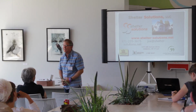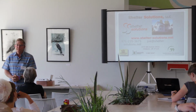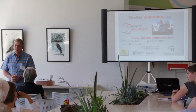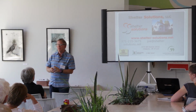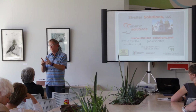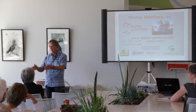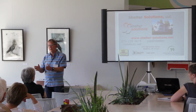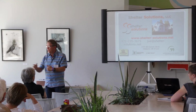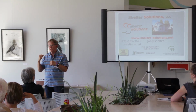Say you buy a house that has a garage, and the garage is sitting right on the property line. Can you utilize that existing? Yeah, I just did that. Here's the restriction on it, very restricted, but it worked for this one particular case. Convert that garage on a property line, grandfathered in, if you don't change the footprint, you don't add to it or modify the footprint, and you don't go up. So just use the original.